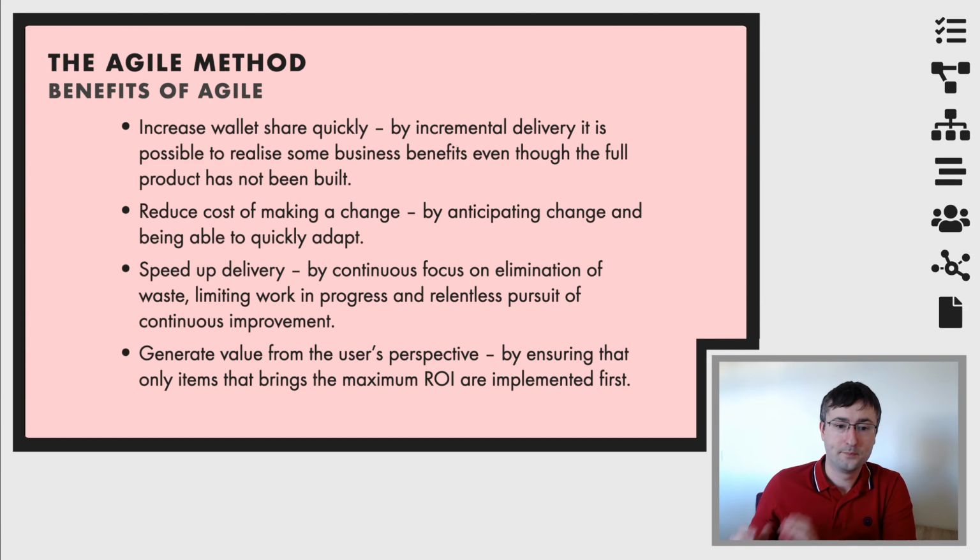Okay, so benefits of Agile over Waterfall. Well, one of the big benefits of Agile is that you're actually doing this incremental delivery. You're giving these benefits to the customer early. Okay, a customer doesn't need to wait 9 months in order to get their new website up and running. They can release it within the month, and then they can have small increments. Customers of your customer can then give them feedback, which can feed back to you, and you can start to build up the value. They can start to make money from the product a lot faster.